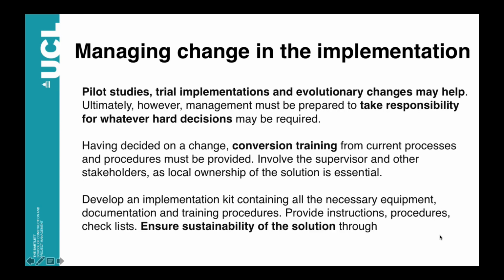In order to minimize the impact of these changes and make this process run smoothly, we need to prepare some pilot studies or trial implementations and introduce the changes step by step, what we call evolutionary changes.